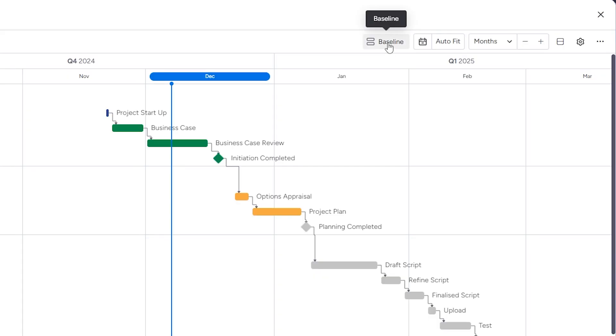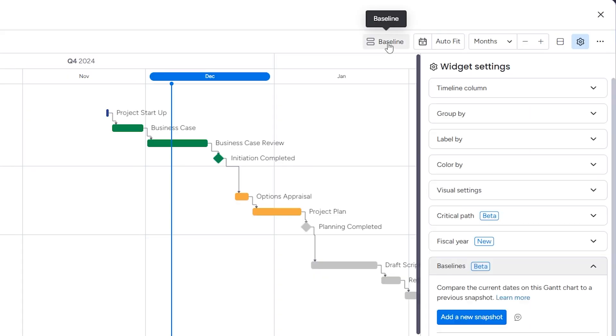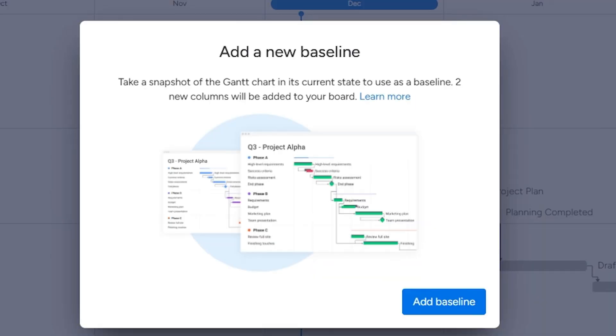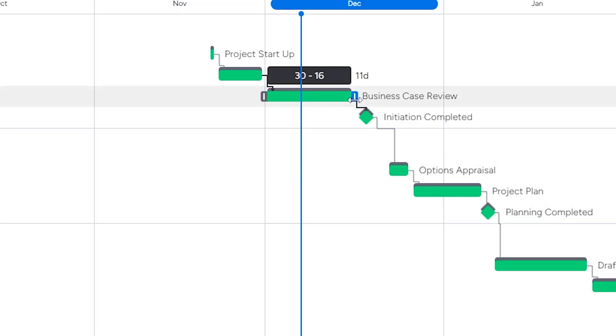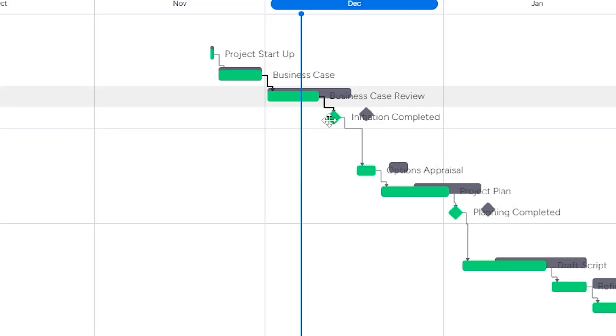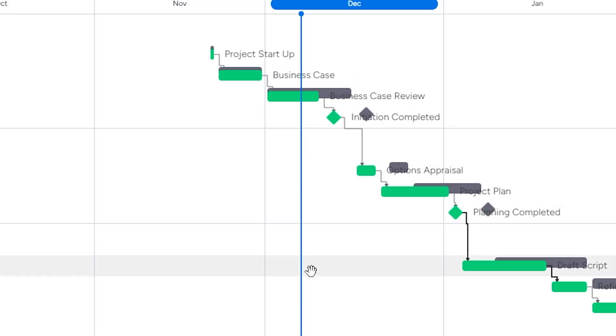Speaking of things you can do here that you can't do on a spreadsheet — in Monday.com you can capture a baseline of your Gantt chart. Hit the baseline button, which opens the widget settings, and click 'add a new snapshot.' Now if, or when, your plan deviates, you can see how it compares to the baseline. Very useful.